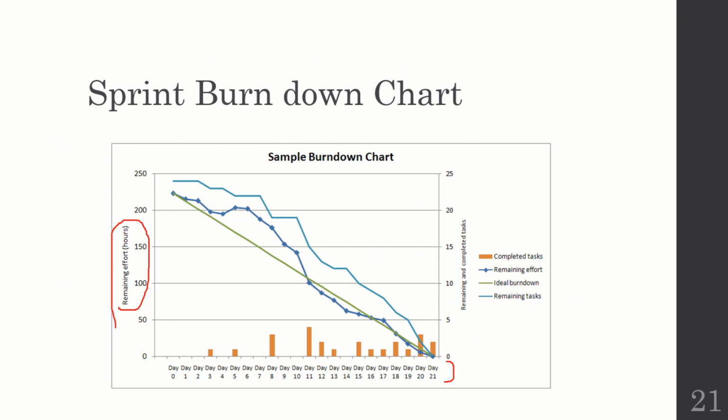I can show you here that we are talking about the ideal burn down chart. It will show you the maximum number of efforts remaining at the start of time, and with 0 efforts remaining at the end of the sprint, making sure that the deadline is completed.